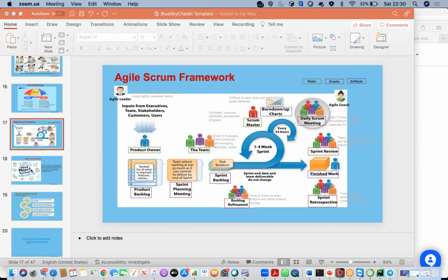Okay. So your team had committed themselves to deliver 50 story points in 10 working days. Now you discover that on the 4th working day, the team has only delivered 10 story points. Do you think that team would meet up? No, they won't. Why?